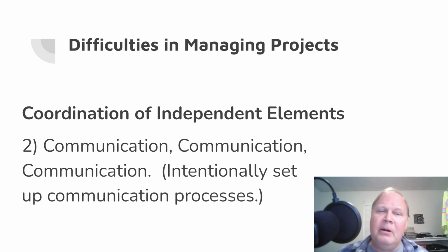Recently I worked on a project where we had an internal chat, and we have operators, techs, warehouse techs, who are going, hey, I have this problem, and they message, and then boom, the person who needs to deal with it responds, and you get this communication back and forth, and you get problems resolved very, very quickly. That's really helpful when you have different groups, different silos working together, to set up communication mechanisms to allow people to communicate. So all that communication doesn't just flow through the management. It's much faster if you get group-to-group communication. And ideally the project management can see what's going on, but doesn't have to be the conduit of that communication, because that can be a real bottleneck.